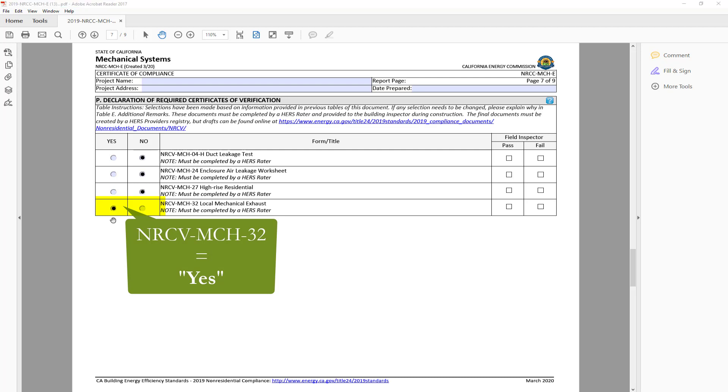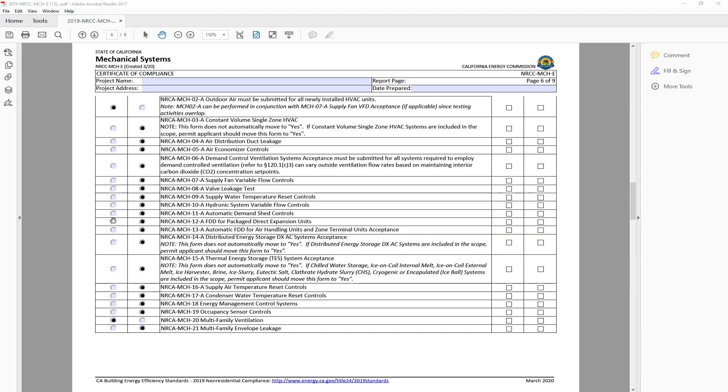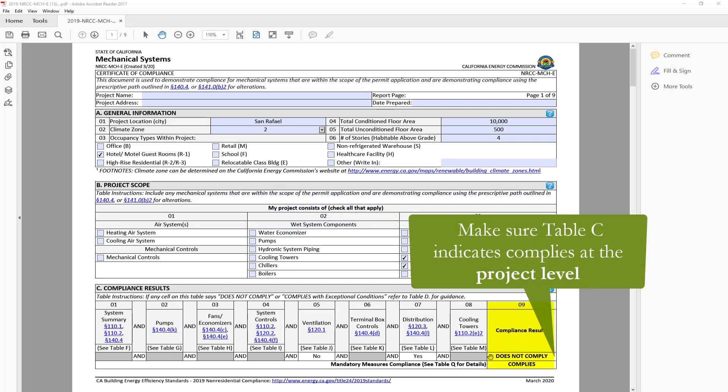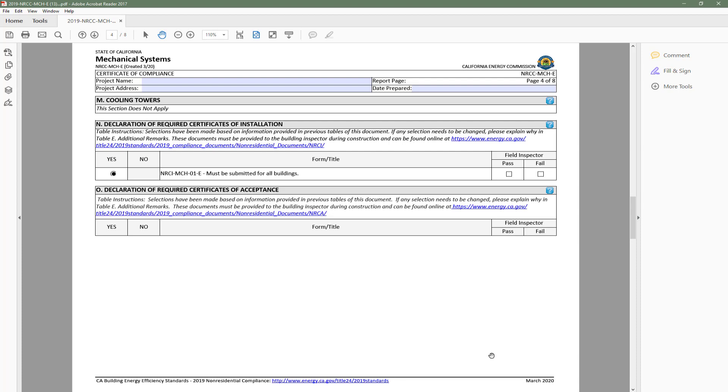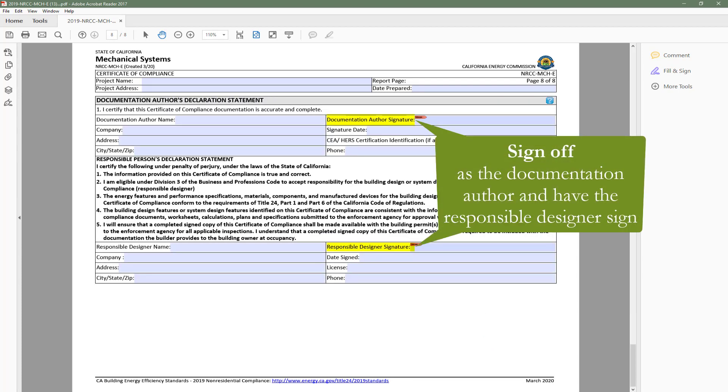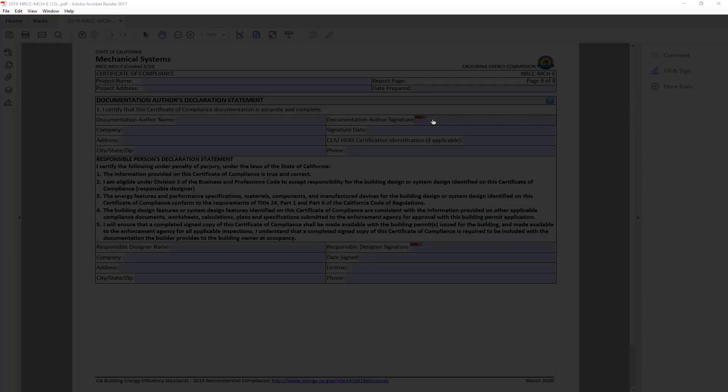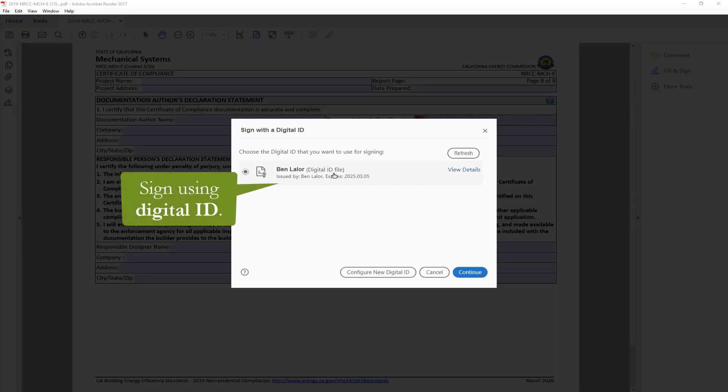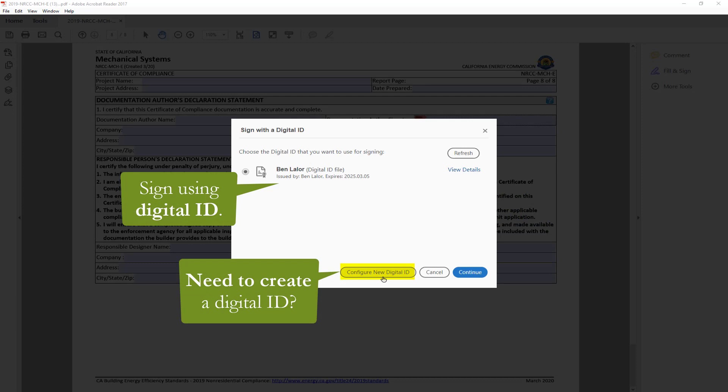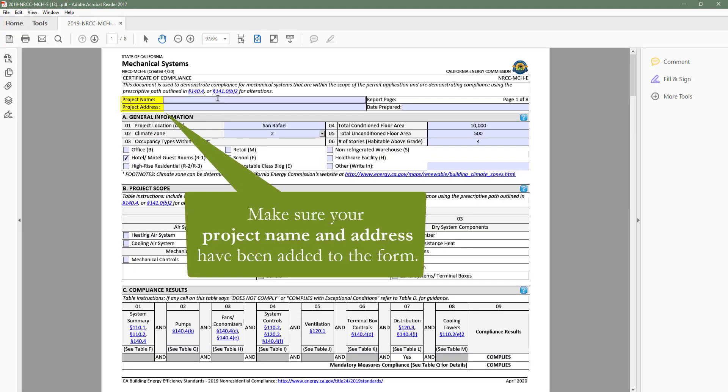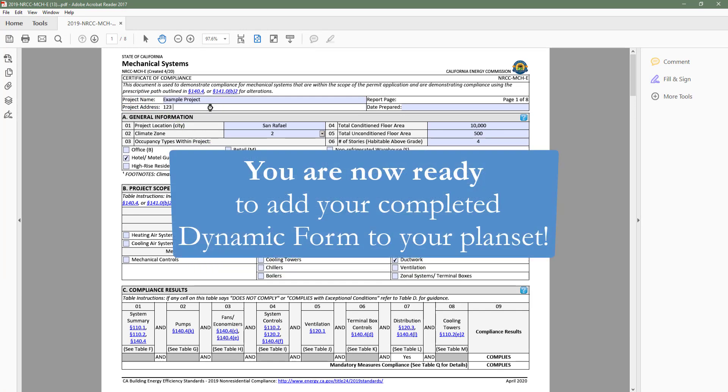Before you add your compliance form to your plan set in order to submit to the local building department, you will want to confirm a few things. One, make sure Table C indicates complies at the project level. Two, you will need to sign as the documentation author, and also get the responsible designer to sign off. You can do this by signing with your digital ID. If you don't have one, you can configure one here. Three, make sure your project name and address have been added to the form and are accurate.